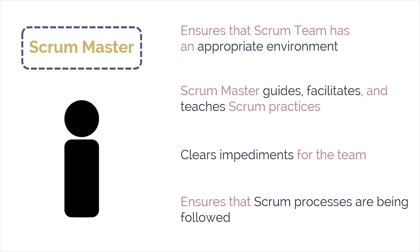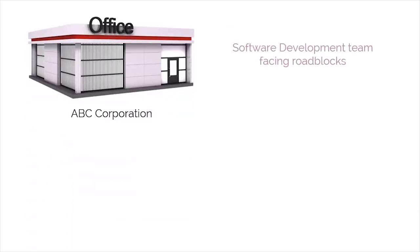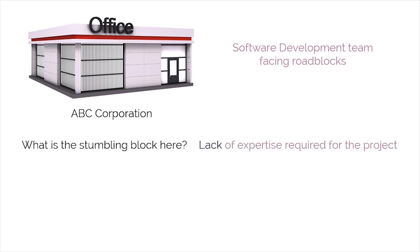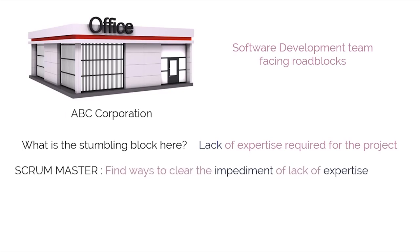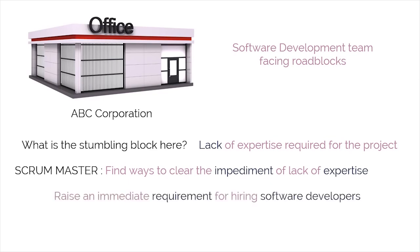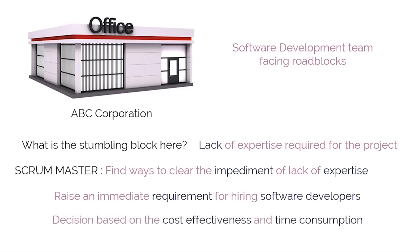Here's an example to clarify. This is ABC Corporation. The software development team at ABC is facing roadblocks lately — they are unable to live up to the set standards of a project in terms of quality. The stumbling block is a lack of expertise required for the project, which in turn leads to delay. This is where the Scrum master pitches in. The Scrum master will focus on finding ways to clear this impediment by either raising an immediate requirement for hiring software developers with the required expertise, or making an arrangement for training the existing staff. The Scrum master will then make a decision based on the cost-effectiveness and time consumption of the action to be taken.